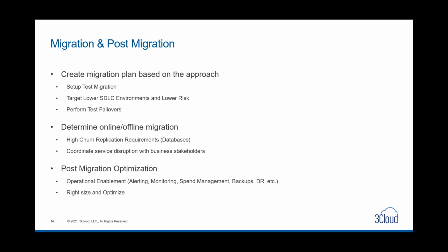And that then builds for a much stronger production release as we get into what has the potential to impact customers, right? We're hitting that from the app side, the database side, and the networking side, and we're taking strong notes. We're making sure that we've got some of our testers in place so that they know what to run through, and what their game plans are to assist us on migration day, to make sure that everything's running where it needs to. These scenarios are critical to the outcomes of the actual production cutover, where you're mitigating the risk for the organization and minimizing downtime.